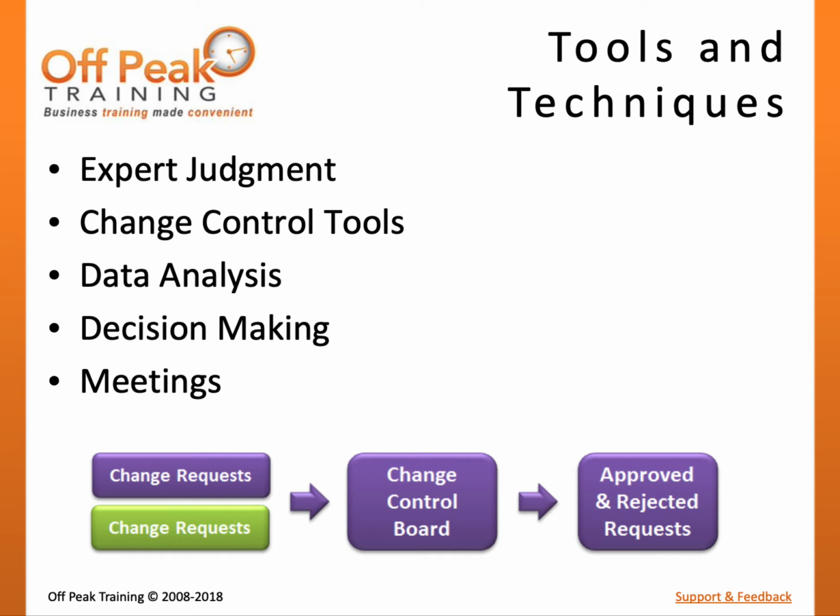On a small project, the project manager may have the authority to decide on all change requests, while on a more complex project, the sponsor, customers, and other stakeholders may need to be involved. The parties that participate in the Change Control Board should be defined in the Change Management Plan, as well as the frequency of their meetings and other rules that govern how the change control meetings will be performed.